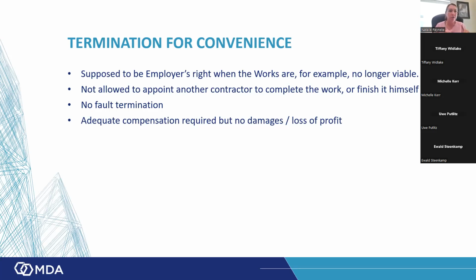Employers like to change this to say, I'm going to terminate for convenience and then I can employ whoever I like to finish the work. That's rubbish. And if they want to do that, then they have to give you an incentive as the contractor, to make sure you get a loss of profit or something like that.